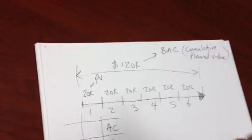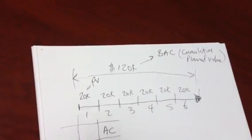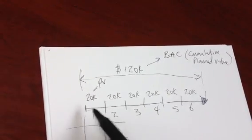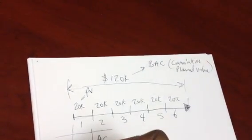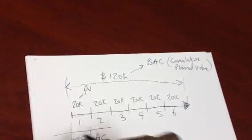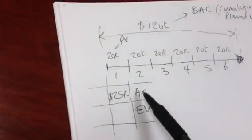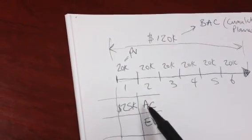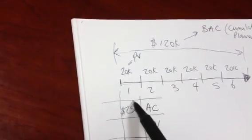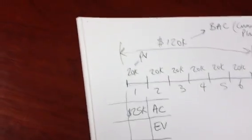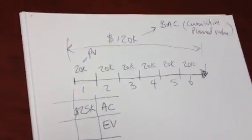So, actual cost is the actual cost of work that you spend for the work done. Let's say you got $20,000 worth of work done. However, because of one reason or the other, you ended up spending more. Let's say you spent $25,000. We call that the actual cost. So, take a look closely at these metrics. PV, planned value, $20,000. That's what you planned to get done within month one. Actual cost is the actual cost of work performed. How much did you spend to get that work done? In other words, you spent $25,000 to get $20,000 worth of work done.